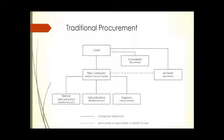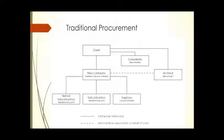Under the main contractor, there are three types of subcontractors. Domestic subcontractors are any subcontractors appointed by the contractor from their own choice. Named subcontractors are those who are named in the contract — for example, the client may specify that if you want to select cladding subcontractors, these are the names they would like to be involved, naming options A, B, and C in the contract.